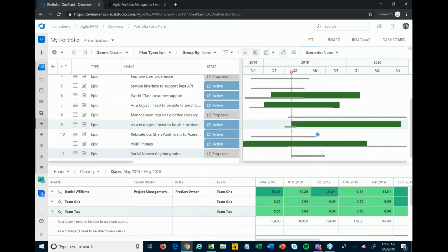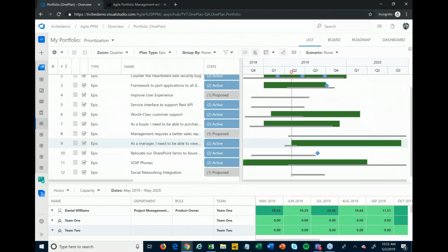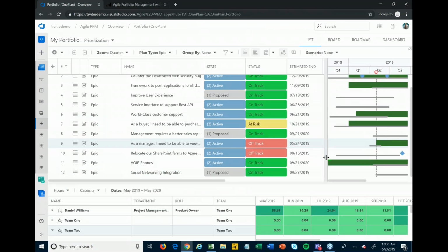And then as a business, with, say, our steering committee, we can figure out what we are going to do. Which option are we going to go with? Are we going to provide more funding and/or more resources? Are we going to not do these items, or are we going to move these things out so that we can stay within our constraints? And so the goal of this portfolio analysis module is just that: high-level top-down prioritization, while keeping in mind our constraints of both cost and resources.